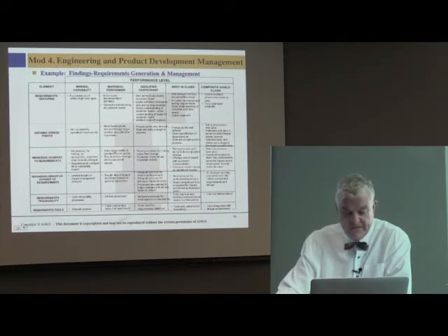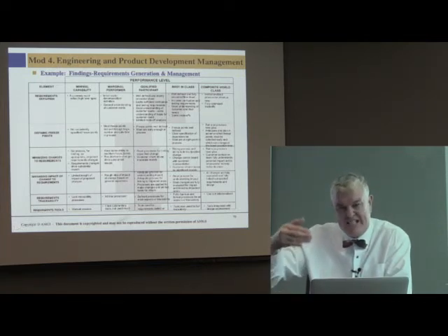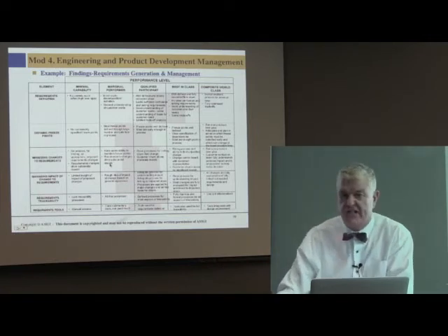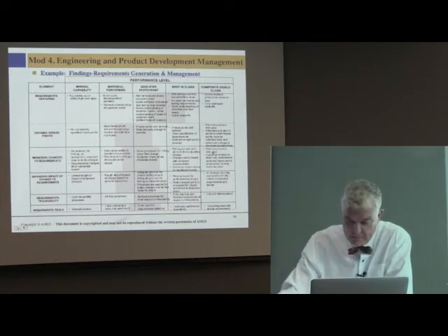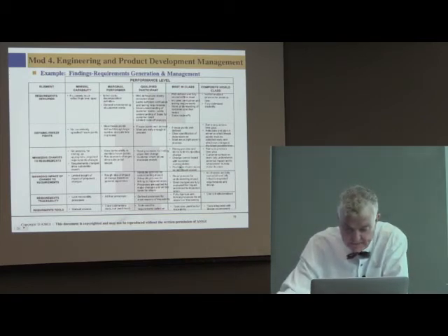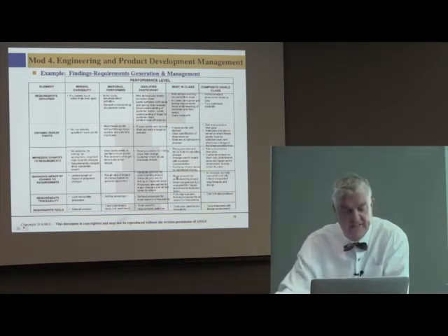So it says they have some ability to maintain freeze points. That's freezing the design. And they require changes. Requirements change drives substantial rework. That's not a good thing. But what you want to be is up here. Strong process ability to limit unjustified change. Change control board with customer representatives. So you got the customer involved. And customer churn causes no significant rework.